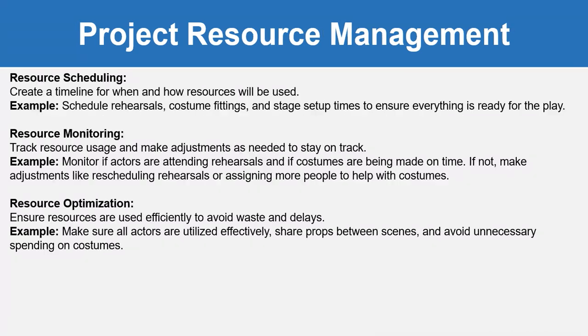Now resource scheduling means creating a timeline for when and how resources will be used. For example, schedule rehearsals, costume fittings and stage setup times to ensure everything is ready for the play. Resource monitoring means tracking resource usage and making adjustments as needed to stay on track. For example, monitor if actors are attending rehearsals and if costumes are being made on time. If not, make adjustments like rescheduling rehearsals or assigning more people to help with costumes.